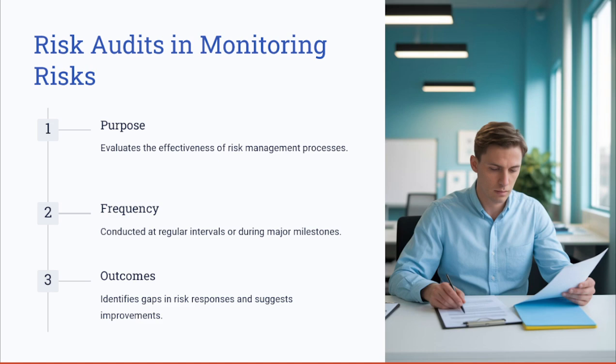Also, the frequency of audits: it should be conducted at regular intervals or during the major milestones. The audit outcomes, as a key concept, identify the gaps in risk responses and should suggest improvements. If you recall when we talked about quality audits, we said that we identified the issue, we understood the root causes.